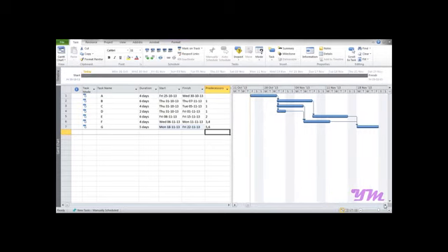So now if we want to look further, yes, we know that activity B is after activity A. If we look at the relationship, activity B, which is this one, starts once activity A is completed. So the relationship is finish to start, which means after activity A finishes, activity B starts. Now if you want to put some time interval between the finish of the first activity and the start of the very next activity, that is generally referred to as a lag in project language.